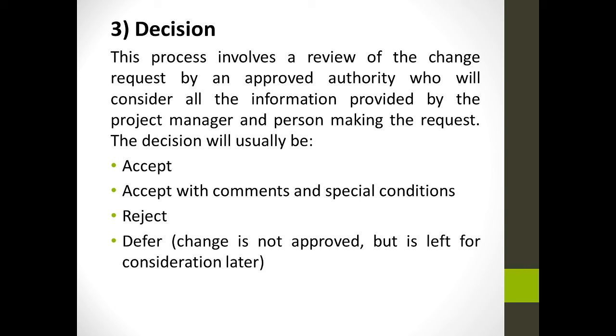Next is a decision. This process involves a review of the change request by an approved authority who will consider all the information provided by the project manager and the person making the request. The decision will usually be accept with comments and special conditions, reject, and defer, meaning the change is not approved but is left for consideration later.